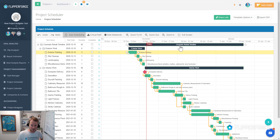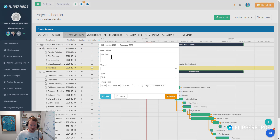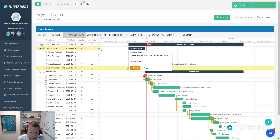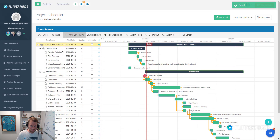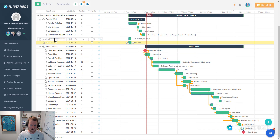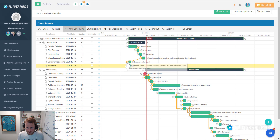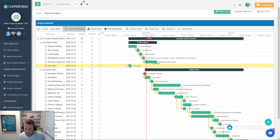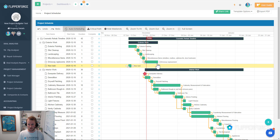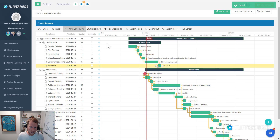If you wanted to add something to exterior work — let's say we're doing a driveway replacement — click the plus icon next to exterior work. If you press a different plus icon up here, it's going to land outside of the folder structure, so you'll want to drag and drop it underneath wherever you want it. If you wanted it under exterior work, that's where you'd place it. You can set dependencies — maybe the driveway replacement won't happen until after miscellaneous items are done. If it takes five days, you can see how the overall duration of exterior work is affected because these tasks are subtasks of exterior work.